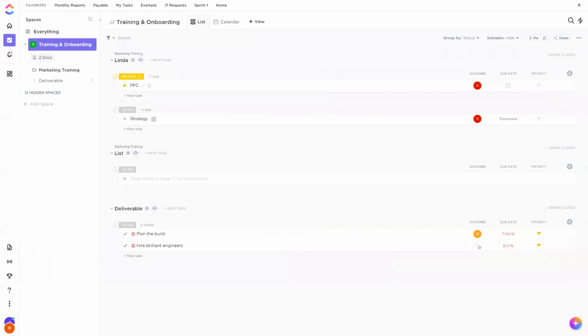Okay. If I have procedures in which a task has to be approved by a supervisor, can it be done here? What I'd typically suggest is setting up a workflow like this that has a review step. And then when that hits the review, the supervisor is the one who moves it from review to finished, or whatever your final status is. And you can set up automation to automatically alert them.